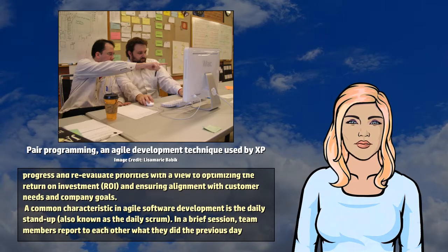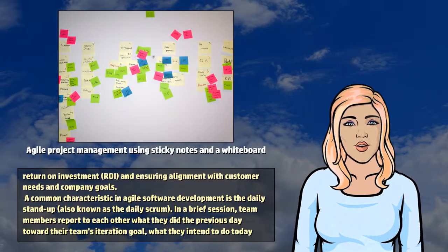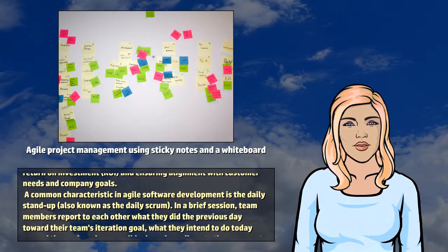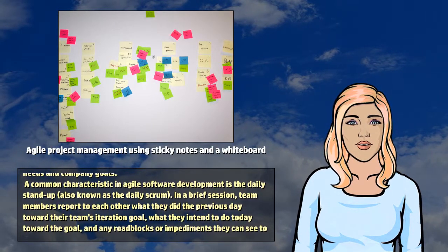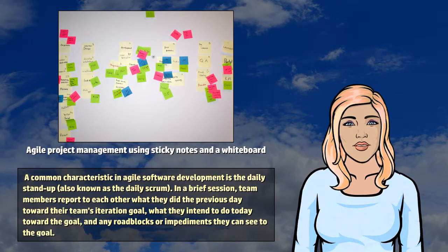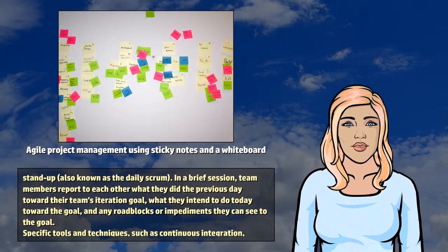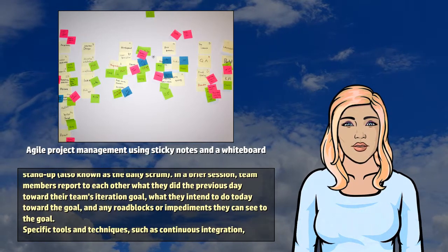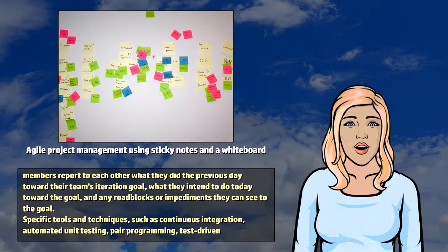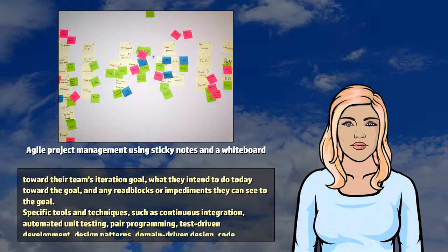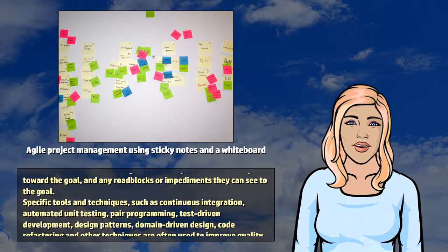A common characteristic in Agile software development is the daily stand-up, also known as the daily scrum. In a brief session, team members report to each other what they did the previous day toward their team's iteration goal, what they intend to do today toward the goal, and any roadblocks or impediments they can see to the goal.